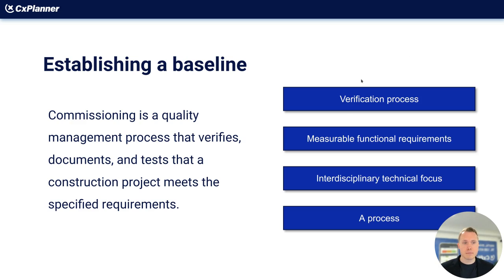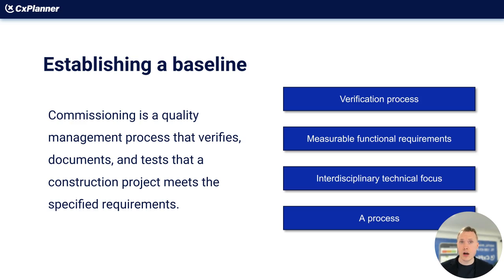The second item is measurable functional requirements. Every requirement in the commissioning process must be measurable — strictly defined so everyone knows when a requirement is fulfilled. Without those requirements, you don't have a commissioning process, because when you're doing testing or verification, you need to do it against something. In commissioning terms, this is often referenced as the owner's project requirements, or the OPR.